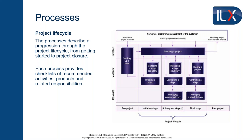In a subsequent stage, Controlling a Stage is the day-to-day work of the project manager. You delegate work to the team, get their agreement, and they trigger Managing Product Delivery — they agree the work, do the work, hand it back. As it comes back you check where you are and might delegate the next work package. At a stage there can be multiple work packages. You also do routine reporting to the project board to keep them informed, and capture and deal with risks and issues — if you can't deal with them, escalate to the board. Controlling a Stage is where the project manager spends most of their working life, using the controls defined in the project initiation documentation.